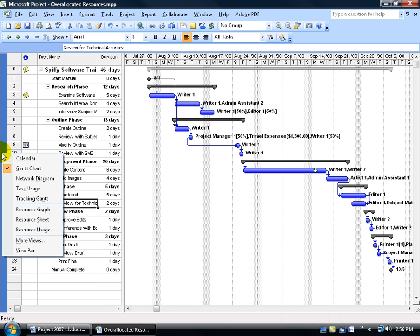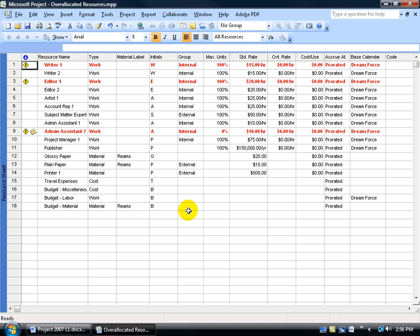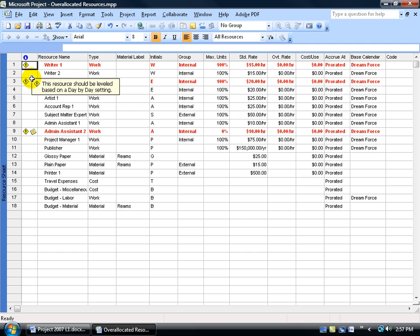Right-click on the collapse view bar, go down to the Resource Sheet, and there you go. It's as plain as the red on the screen. Any time you see red in the Resource Sheet view, it means those resources — Writer 1, Editor, and Administrative Assistant — are over-allocated. Where are they over-allocated? Is it too much work in one day, or like the administrative assistant who's not available until October 13th? Notice in the indicator column these little yellow icons saying this resource should be leveled — that's the next training video.